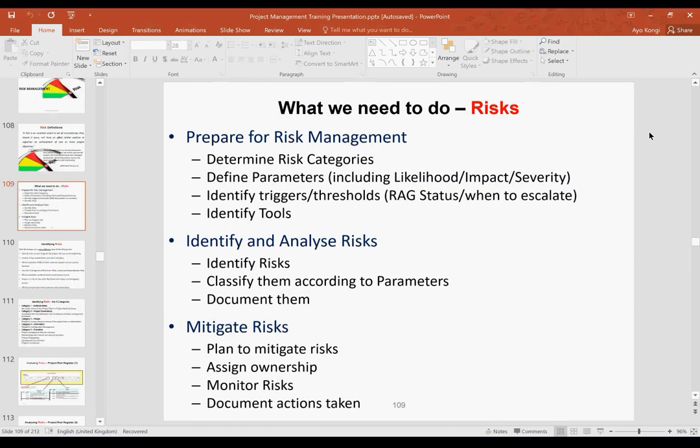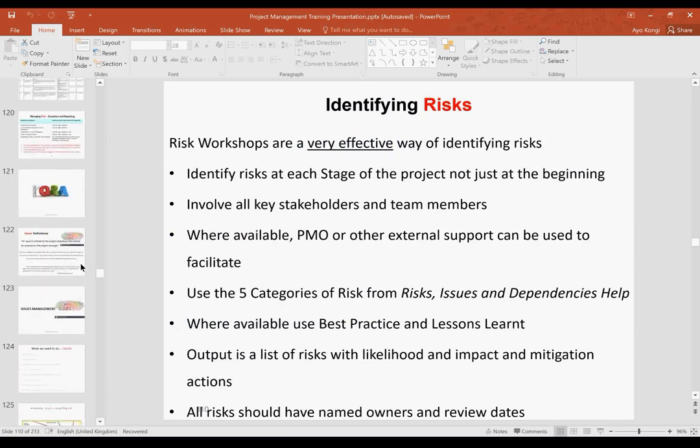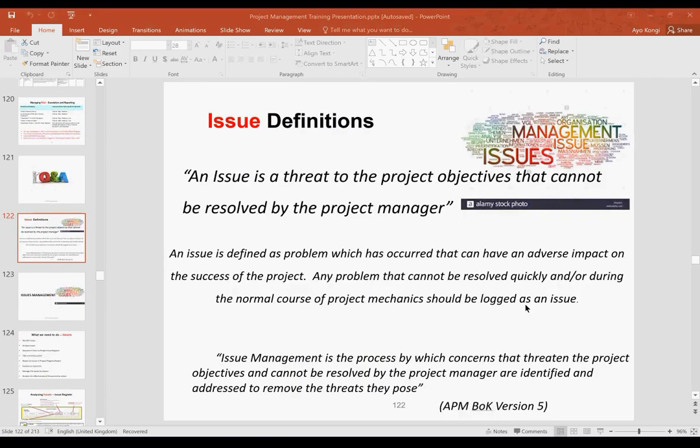So at the start of a project, when you're doing your risk management strategy, you want to have your risk process in place, that this is how we want to manage the risk. And that is what the risk management strategy is actually all about. Does that answer your question, Francis? So the first thing you need to develop is a risk management strategy. What's the strategy for us to manage the risk? That is what will trigger your log. It is what you agree in the risk management strategy that you will use in developing your risk log or your risk register.